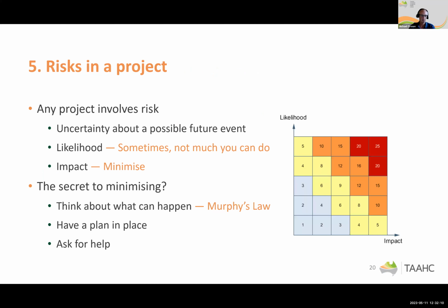All right, fifth topic is risks in a project. Yes, there are risks. There's risks in anything that we undertake. And the whole point of risks within project is to try and identify them early so that we can see what risks are there, and then we can try and minimize them. So a risk is defined as uncertainty about a future event, and it's usually made up of a likelihood and the impact.